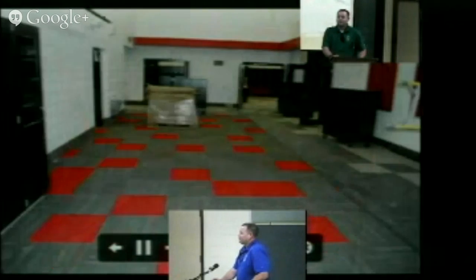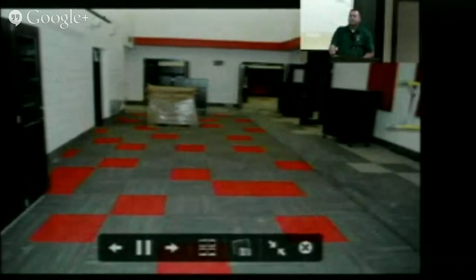Great. Now, do they have the air conditioning running? Yes, the air conditioning is up and running. I believe it's up and running everywhere but Unit F. It felt a little warm in there today, and they were doing some final piping in there. So they have it up and running everywhere, which is good for your installation of your wood flooring in particular. That has relative humidity requirements they have to maintain, so they'll be doing that.